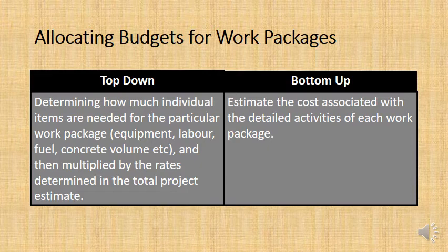And when you do that, you say, well, it's 200 hours of crane use to install the windows, and a crane will cost me $250 an hour, but I also need to include the cost of establishing the crane, because you basically are assuming no one else in the project is going to use the crane, so you've got to cost it when you are budgeting your work package.